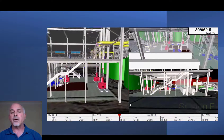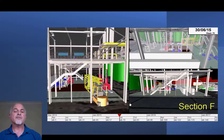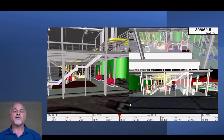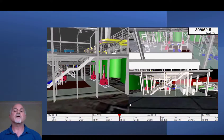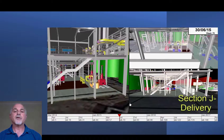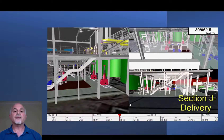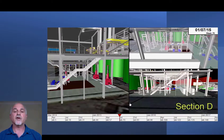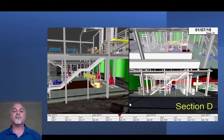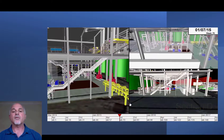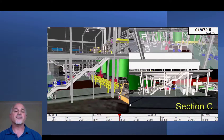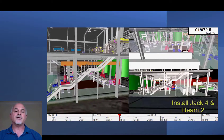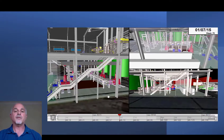This is combined with the design model, as well as construction equipment and other logistics and the schedule. All this is combined so that the construction team can practice in a virtual space the installation — in this case, of a large prefabricated assembly. When they actually do the work in the field, the work is done with less stress, done safely, and it reduces the construction time required. Great value to the owner and a great example of VDC.